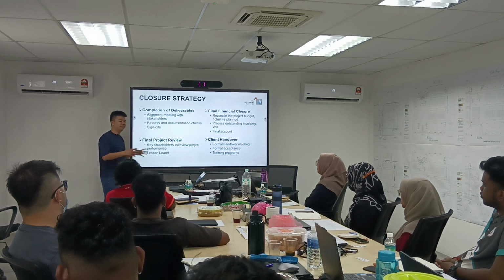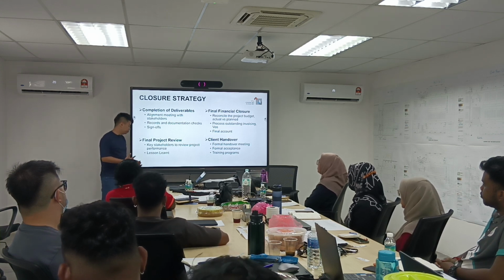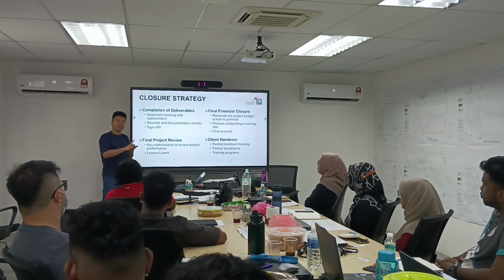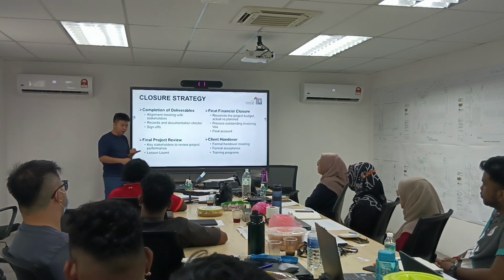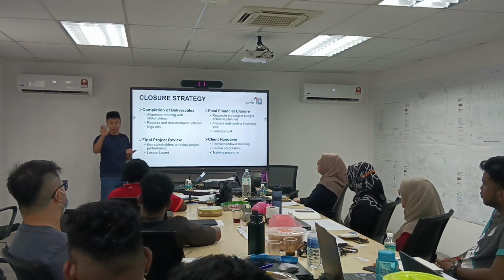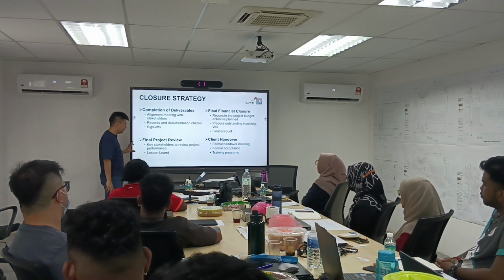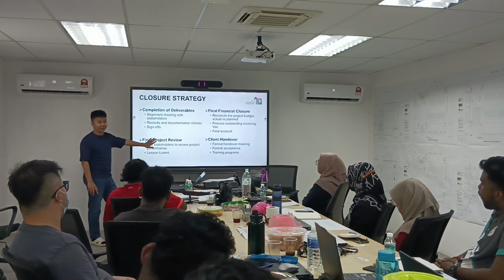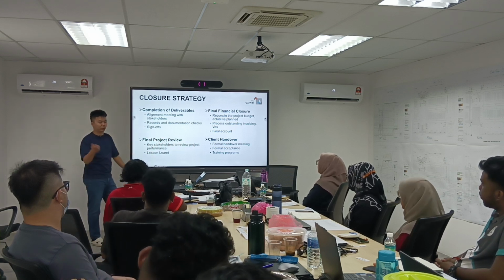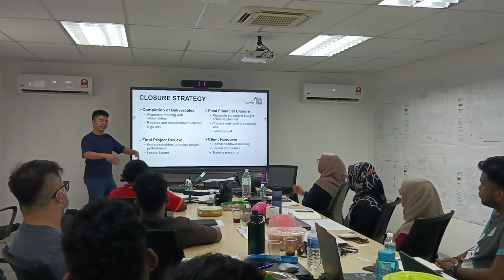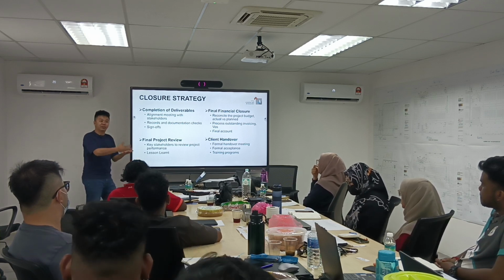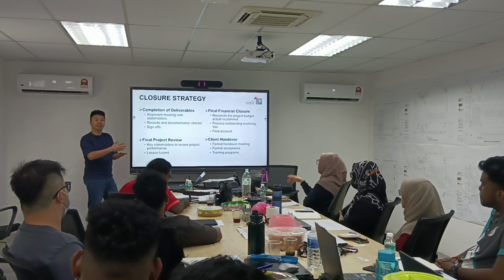We should have a very candid review about lessons learned. Throughout the whole project, definitely there is argument between you guys because you feel like this is his scope, this is not my scope, should be done by him, not by me, blah, blah, blah, etc. So I think after each and every project, we should sit down and be very candid. It's not asking you to throw spanners or throw chairs. It's just that we all sit down together. We want to understand where is the gray area. We make it more well-defined.